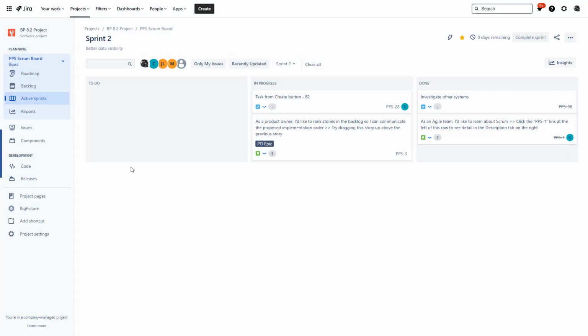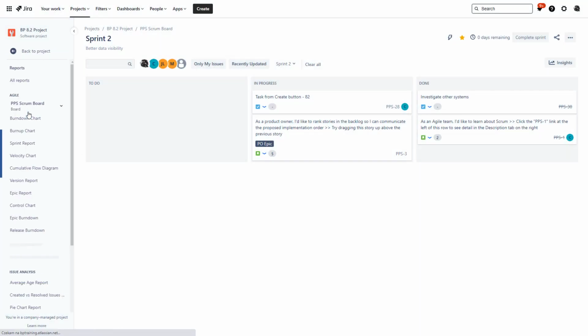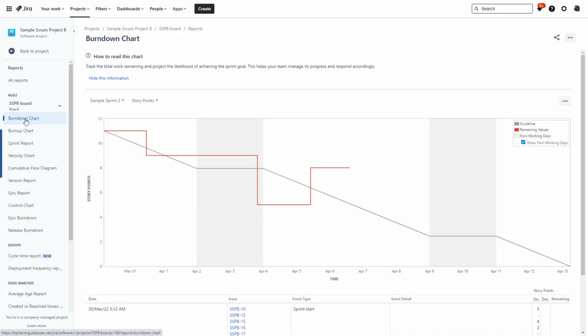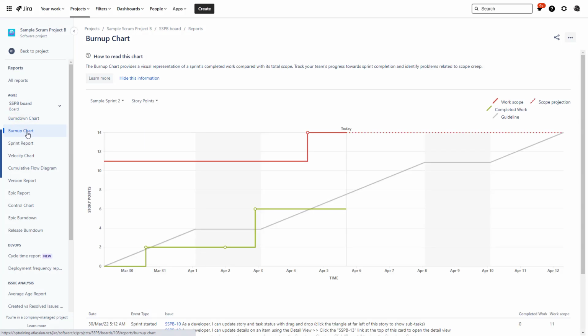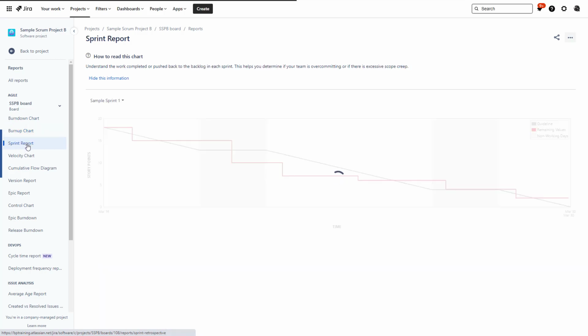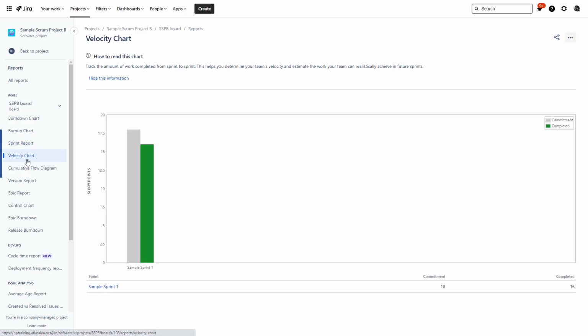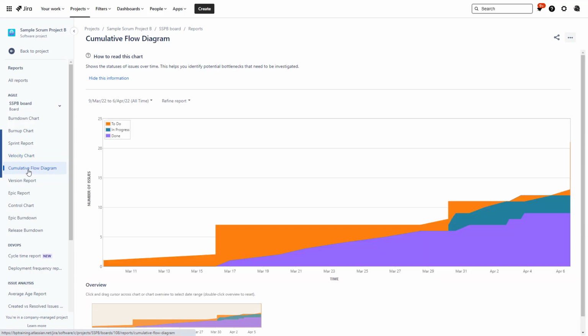During a sprint, you can monitor and track your progress on the Reports tab to see if the team is on track, what blockers or challenges the team may be facing, or to check a summary of work completed. The best practice is to have only one active sprint at a time, so that team members can focus only on the most important tasks that are in a given sprint and deliver them more efficiently. Tasks not in an active sprint should not be worked on.